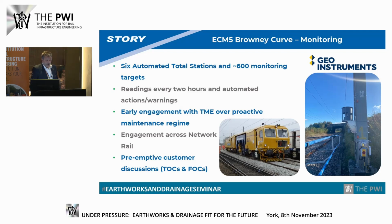I'll quickly mention monitoring. We've got 6 active total stations that we've just established at site, readings every 2 hours, early engagement with TME over maintenance. There's been very good engagement with capital delivery through Project ACE, that we've engaged with works delivery to supply the power to our total stations, which probably would have taken us months to do, we got that in within a few weeks. And also Network Rail being able to have preemptive discussions that we've supported with the toolbox talks and briefings so they can understand the issues at the sites.